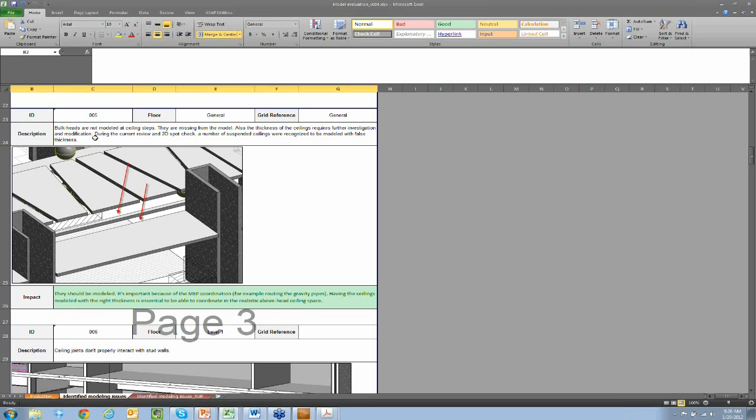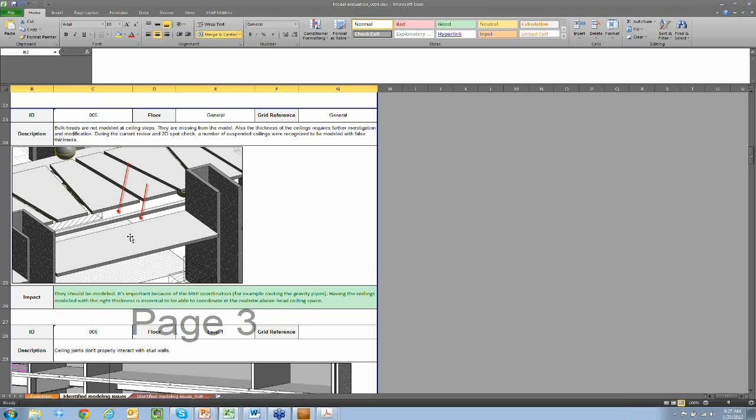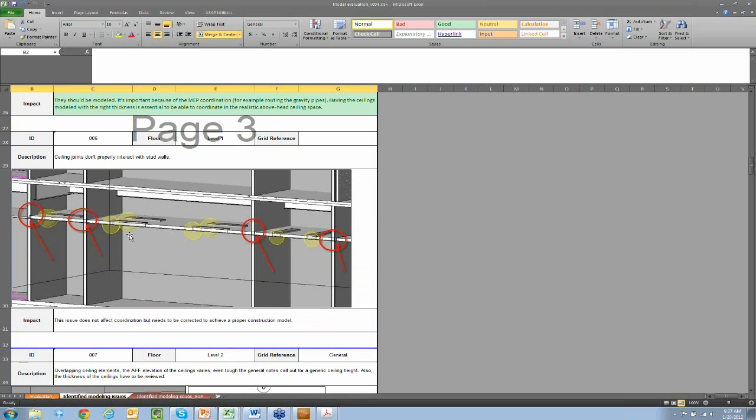So in this example, the bulkheads were missing from the model. The amount of framing, the stud framing and everything that needs to go into these bulkheads, and the fact that MEP elements often pass through them, we would advise the client in this situation that this should be updated and corrected within the model before we proceed with it as a coordination background.